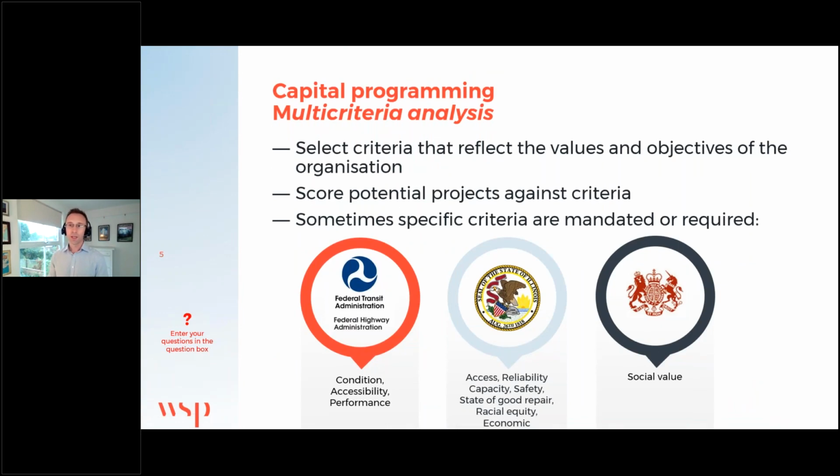So one of the ways that you often do this is using something called Multi-Criteria Analysis. And to do this, you need to select some criteria that really reflect the values and the objectives of your organization. And then you can score those potential projects against those criteria. Sometimes particular clients might have mandated or required criteria that they have to use in this.